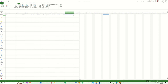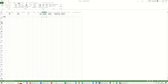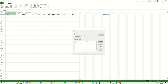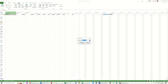Now, the cost variance field — I haven't added any extra costs in, so that's not been changing. I'm going to do that now. I'll go down to the resource sheet and add Bill, who is also at £10 an hour. This is additional from the baseline — I didn't plan for this. I'll go back and assign Bill to that task, so now we've got a double assignment. If I go back to Project and put the status date to the 7th.